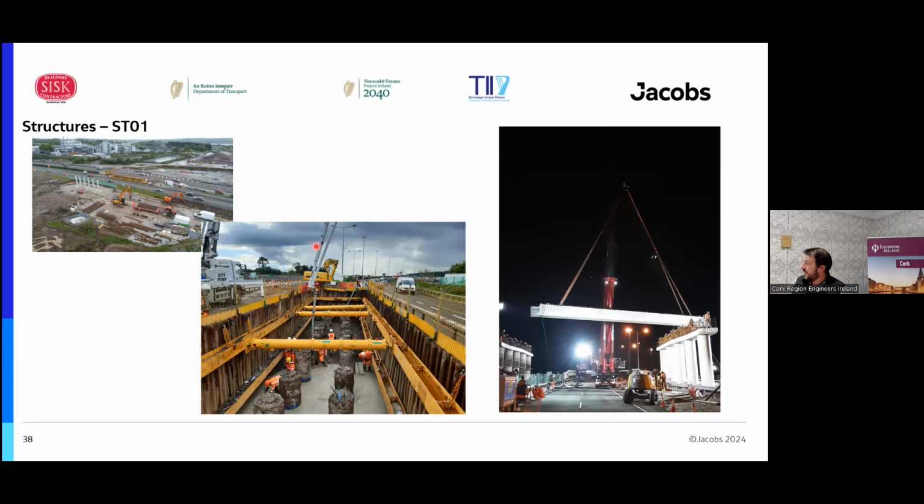The CFA piling was always done from ground level, and we couldn't accommodate the rig with the space limitations we had, so we had to lower the ground or move carriageways left or right from the centre.